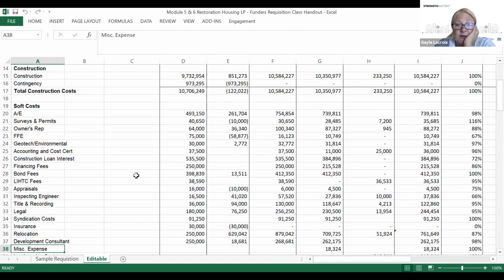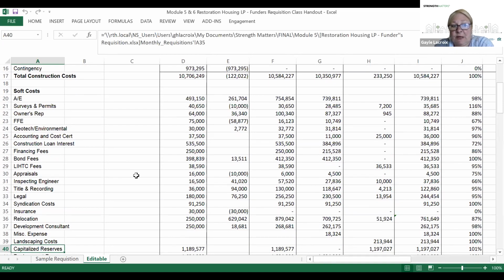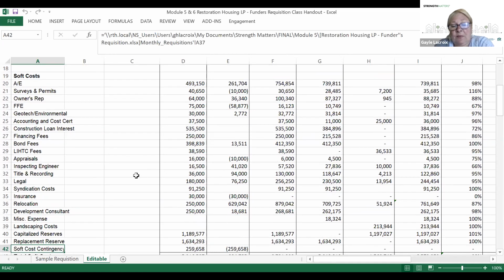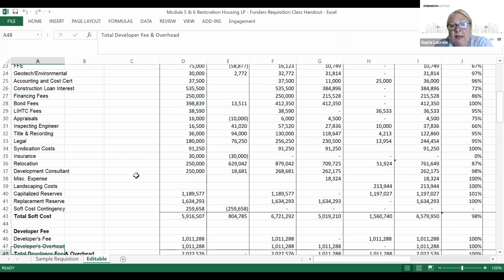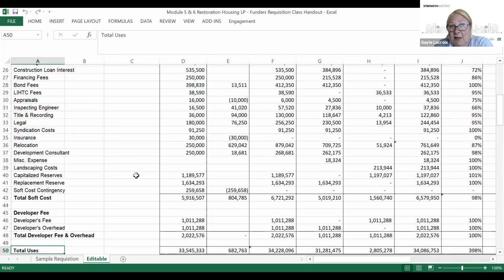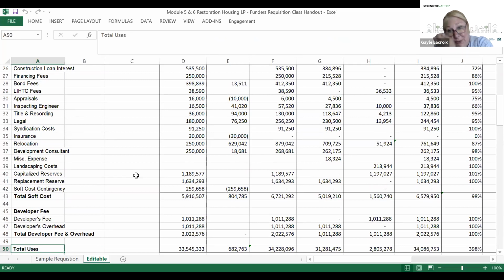And you'll see each cost, and we talked either last time or the time prior about making sure these categories are the same categories in your general ledger. You want to make sure that these tie out to your general ledger. We did say that different agencies have different staff that prepare this. It doesn't really matter whether it's your development staff or your accounting staff. I always argue that it be the accounting staff, because I say, after all, it's just an invoice, and why doesn't the development team just review what we're doing? That way I can be assured that we're all tied out to the GL.